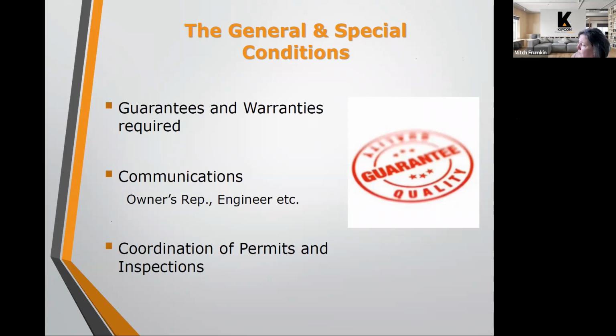So if an engineer goes out to the site and has a discussion with the contractor on a particular day and is reviewing the work, comparing it to the specifications they've prepared, or if there's any special issues that come up during the course of the work, that gets documented in the field report and submitted to the owner for each field visit. So that type of communication is spelled out in the scope of work.